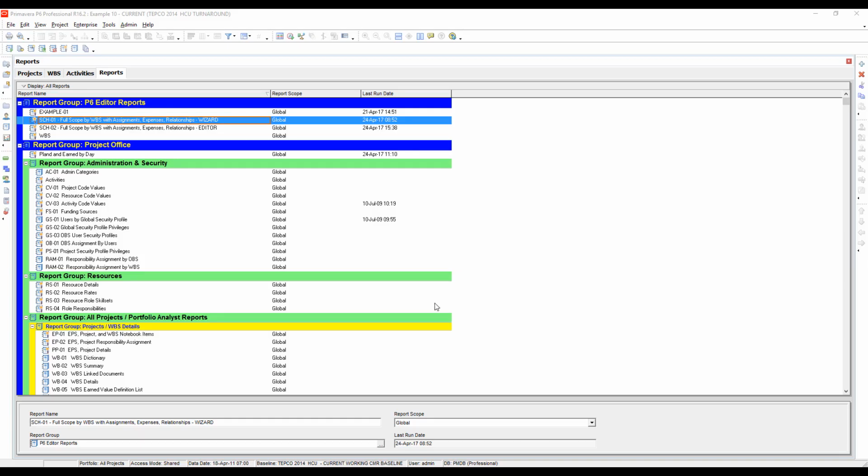Before we finish up this video, I'm going to show you a bit of a more elaborate report. I have a turnaround schedule open, a refinery turnaround schedule, and I want to create a job scope report. The intent will be that we can put a filter on this report and run a scope for one of the particular WBS elements. This could be useful for job walks or just to let the team know what's involved with doing the job.